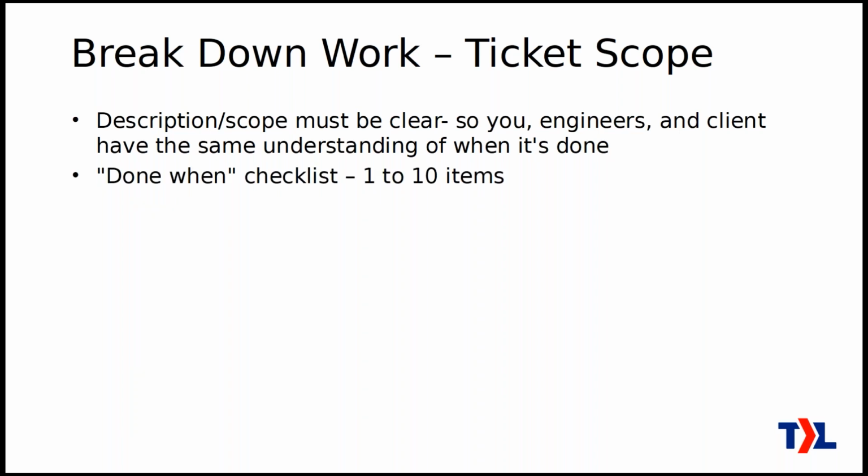What we've found works really well is, we found ourselves talking about tickets that were "done" versus tickets that were done, meaning a ticket we'd say is done, but actually there's one last thing, one last piece of documentation, or we have to tell the customer it's done, so it's not actually totally done. But then we say it's done when it is actually 100% done and everybody can agree on it. So we started having a checklist that says "it's done when," and then we just write out, one,